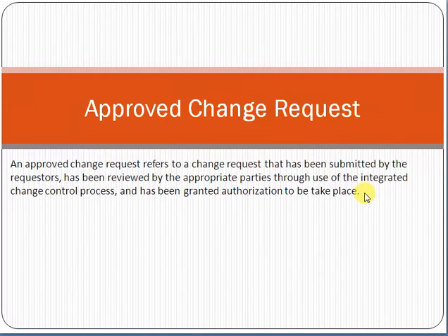What is a baseline? Baseline means the factor through which we measure the performance of a project. Let's assume that you have to deliver a project in 5 months, so you baseline the project that in 5 months the project should be delivered. If it has been delivered in 5 months, it means it's okay, it's good. If it's delivered in 6 months, that means it took one more month, so it's not good. That means you have taken one additional month, so the performance is not good.